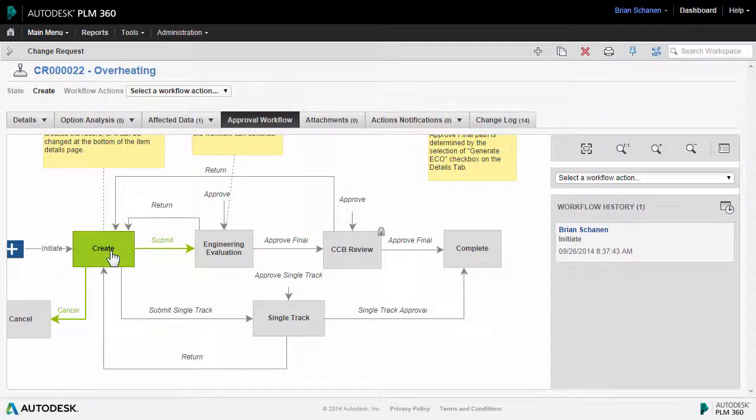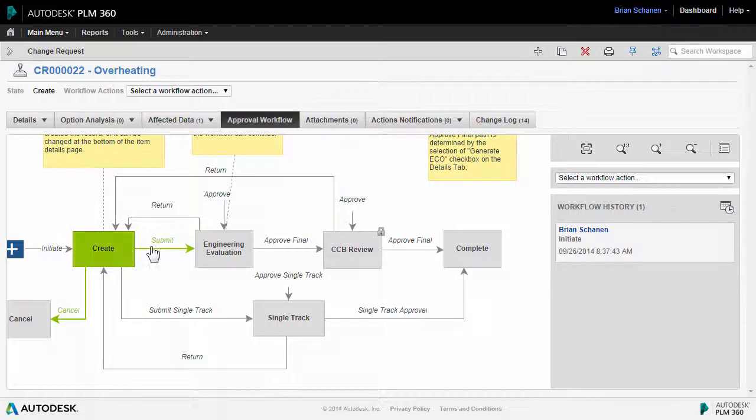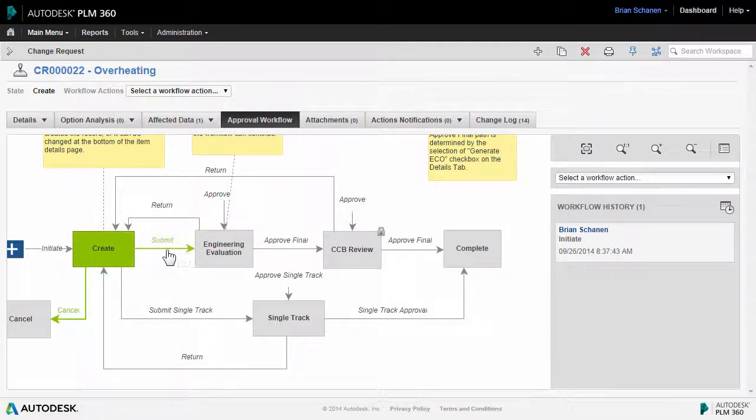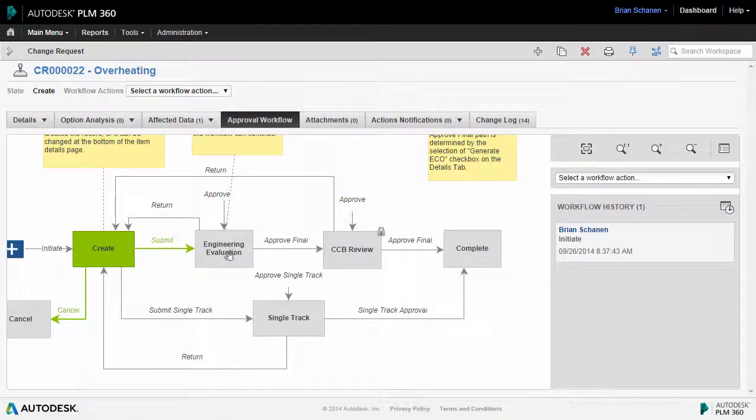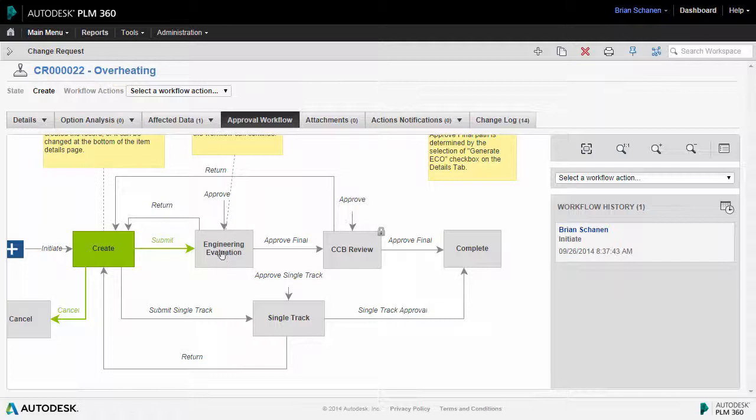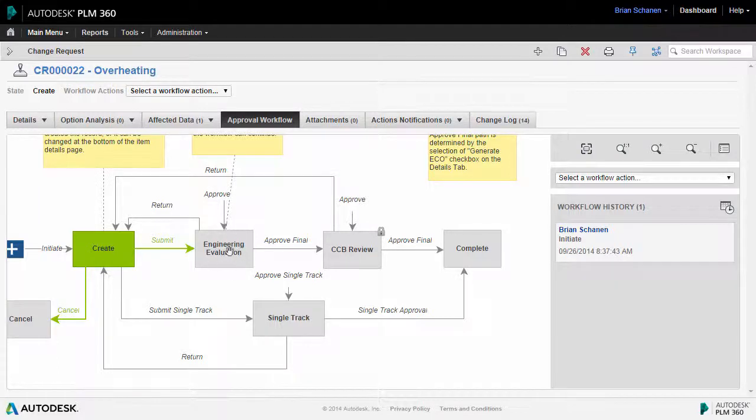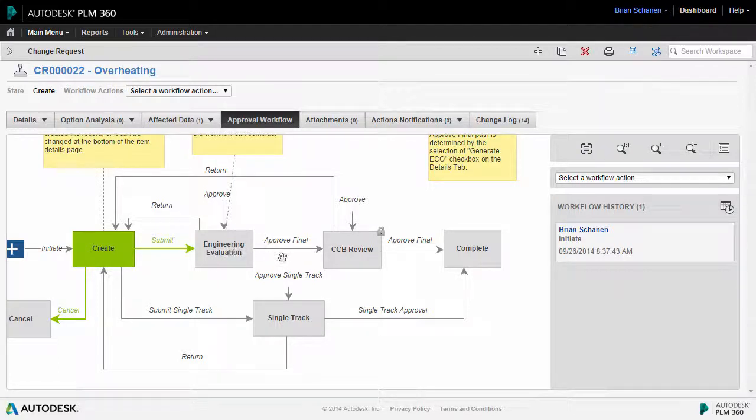Right now we are in the create state and we can see that there are two ways out of the create state. One is to cancel it altogether and then the other one is to submit this for engineering evaluation. All people that are part of the approval team will receive an email at this point and they'll be required to log in, approve the ECR in order for it to move forward down the stages.